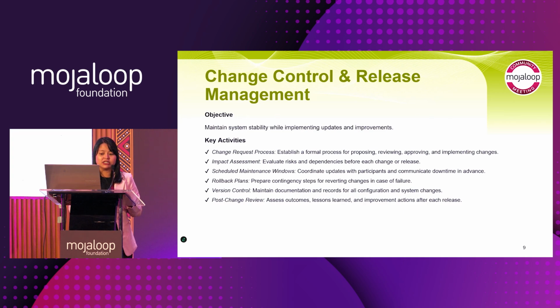impact analysis first. They should also test the new release features, such as testing the transition, and also check whether the existing features are functioning or not. They will also test the new release features in the payment scheme and in the related operation portals. Based on the test result, the focal points report to the change control board. So in the hub operation team, we should form the change control board with a few members.